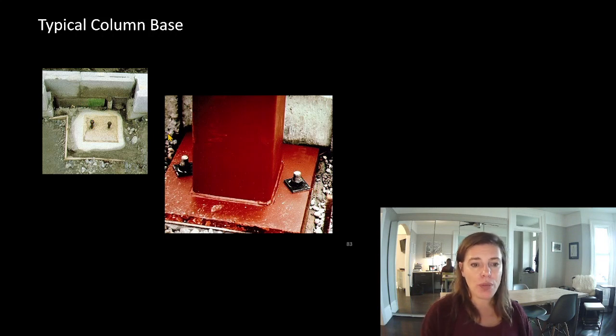It tends to fall through the cracks because we have the steel supplier creating the anchor bolts and the concrete contractor installing them. And the concrete contractor is not necessarily aware of the importance of that element that is crucial to the steel fabricator. So having a contractor that can really mesh those two trades is really kind of a real bonus on a project.